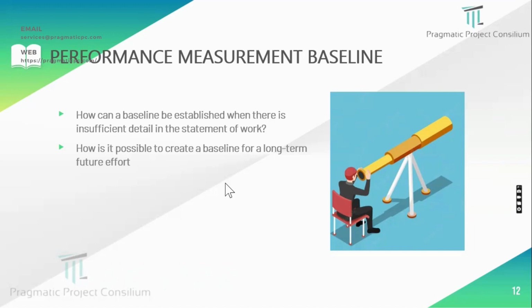Long-term projects come with many interdependent activities, and a lot of long lead items are connected, some with manufacturing time and delivery time as well. In some types of projects, we have to monitor very closely, and when the material needs to come, it has to come.